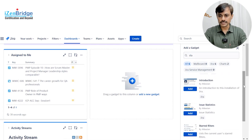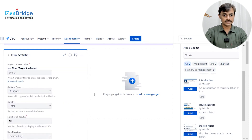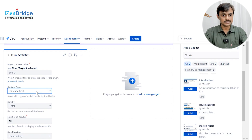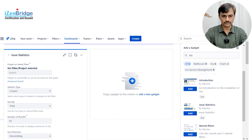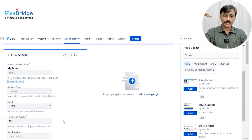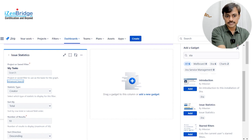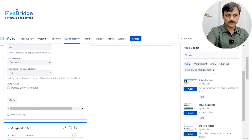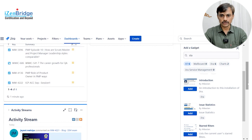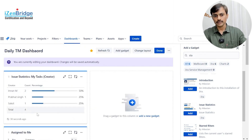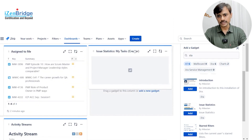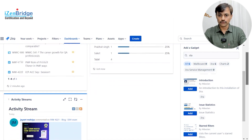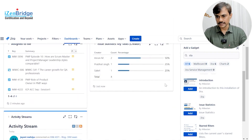With issue statistics, you can choose what you want to see — for example, who created the issues assigned to me. The filter is an important thing; if you don't put the right filter, the dashboard becomes confusing. So I've put the filter 'issues assigned to me' and I'm showing statistics by creator with the total number of issues. This helps me see a summary like: these are the open issues with me, created by these people. As a manager I want my engineers to keep an eye on priorities and who has created what.